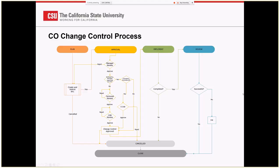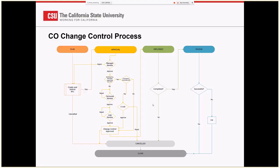I'm looking at a change model here. Is this the change model just for standard changes, or are these for all changes? All changes, in my opinion. Informationals don't go through every single stage, they go through the manager review but not through the tech review. But standard, urgent, and emergencies will have to go through some kind of CAB. Emergencies probably won't go through a formalized tech review, just a straight CAB. For the most part, I would say 95% of our changes go through this workflow of tech review.